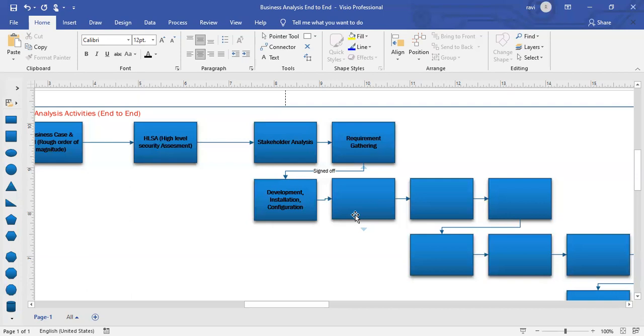For a new one, it's slightly different in what we do initially. Even before we have the business case, we do the gap analysis. We float an RFP and do the vendor assessment and all of that before. That's the difference, because here we are not looking for another vendor. In the case of a new product, we gather the requirements and then we float a request for proposal to an external vendor, and we get their feedback, then we do the gap analysis, and then we do the business case.